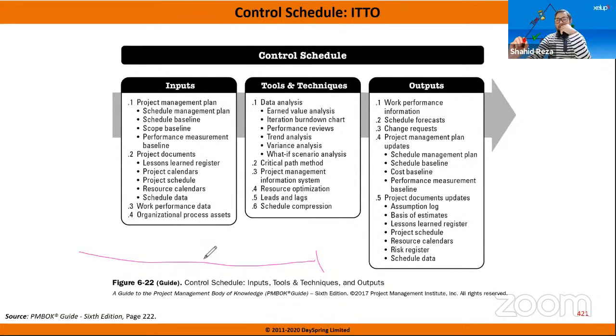Because the iteration duration is already fixed, 2 weeks or 4 weeks. So if you know we'll need, say, 10 iterations, you can easily say it will take 10 months because our iteration size is 1 month. This way they can plan the whole schedule of the project.